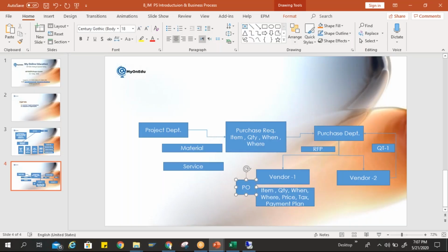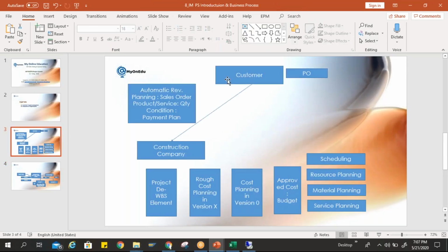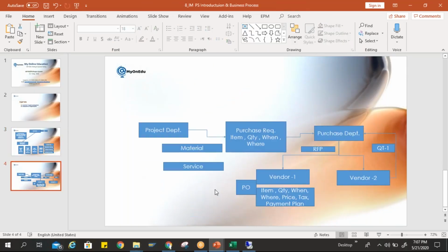As per the contract, as per the purchase order, sales order is from the customer side and purchase order is from the vendor side. When we are creating a purchase requisition or purchase order with reference to my project, this cost is blocked. Whatever cost is calculated based on the quantity and the price is blocked in the system, meaning it will be checked and compared with my available budget. We call it commitment cost.